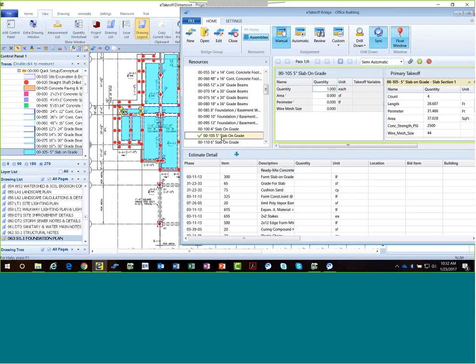Drag it to the 5-inch slab, and what it loads is it'll load that assembly just like it would load it in Sage. And it gives you the same variables you would fill out in Sage. You could put in your information for your WBS codes here, but it also loads next to it. Here's what we have in eTakeoff. Here's the information that we have in eTakeoff.